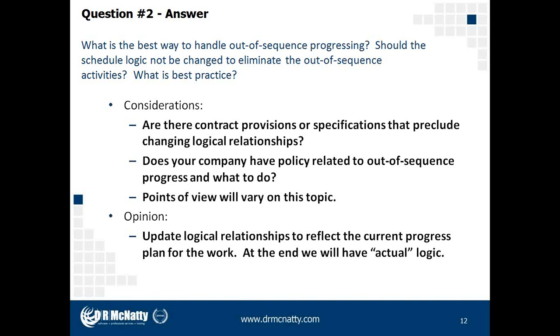I like the idea that the logical relationships will be changed to reflect how the work was actually progressed and performed in the field. And so at the end, what we might have is what would amount to perhaps actual logic. And if there's ever a scenario where you are doing a collapse of a schedule where you strip the actual dates out and move the data date back for maybe an analysis of a delay, the actual logic will support your case much more effectively.